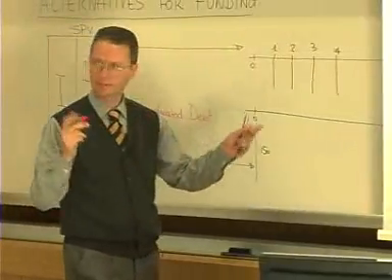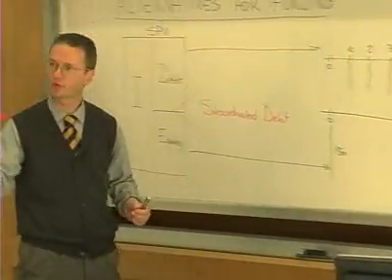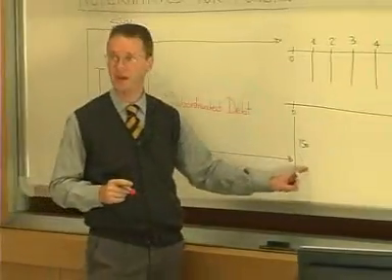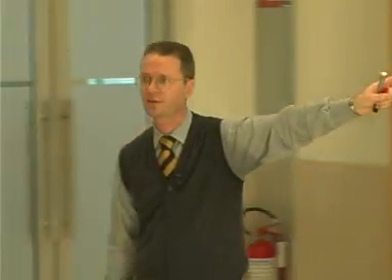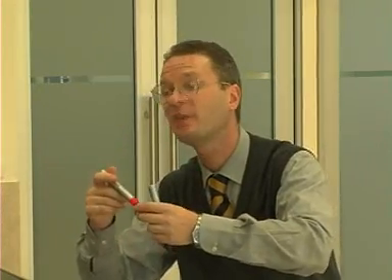When you use a pro rata, you can postpone contributions in the future, but you start immediately using cash from banks. And this generates a capitalization of interest. On the other hand, as long as you anticipate the amount of equity contribution, you can save part of the capitalized interest that is required on the funds used from banks. Which of the two is the most relevant effect will be calculated by using a financial model that will tell you exactly which of the two alternatives will show you, as a shareholder, the right payoff.